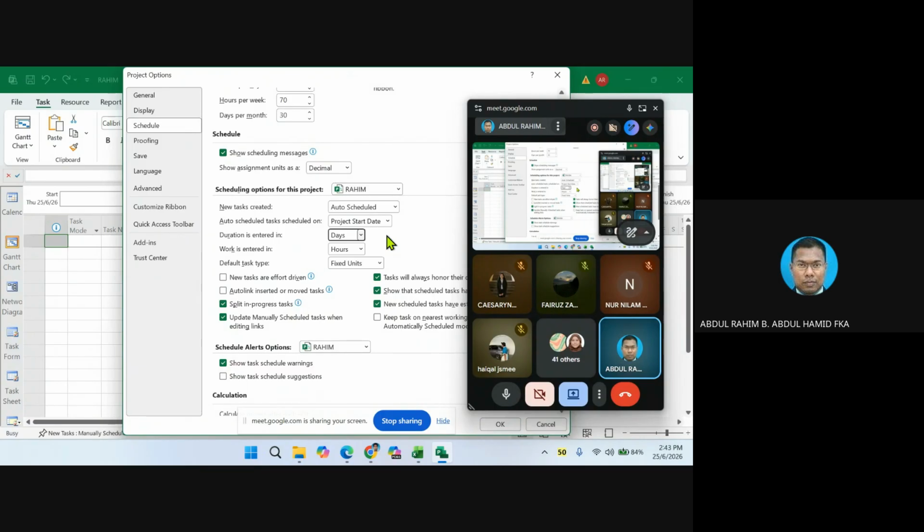For instance, one surveyor, meaning one unit, is going to work for 1 day. And 1 day is equivalent to 10 hours. So 1 times 10 is equivalent to 10 hours. That is what we call work, work in terms of hours. But if work is in terms of duration, it is only 1 day. So work is basically defined as unit of resources, time, duration.